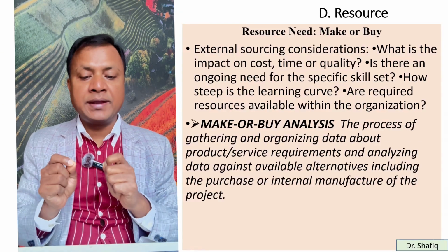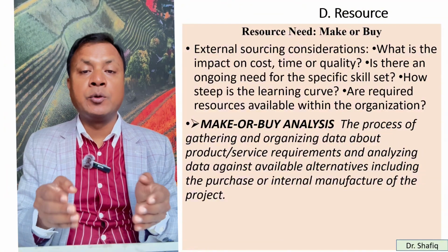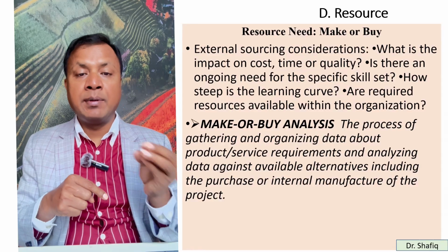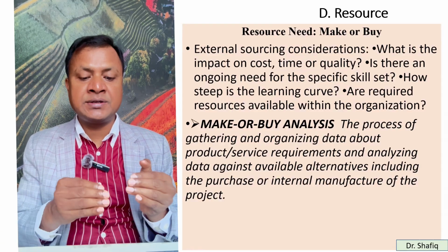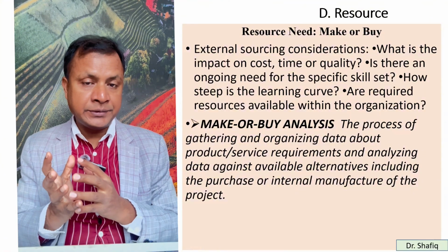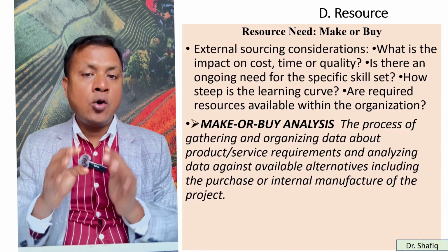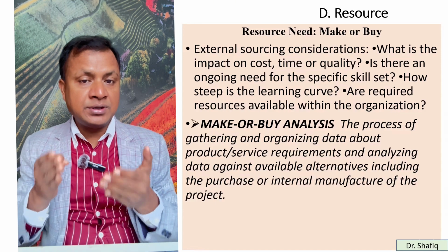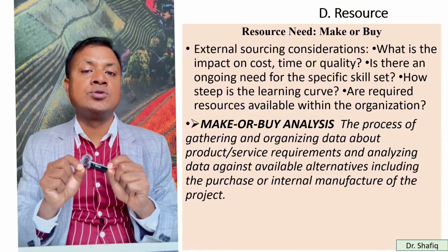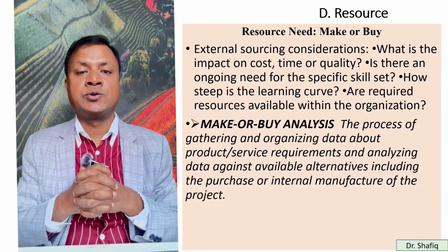So make or buy analysis is the process of gathering and organizing data about product and services requirements and analyzing the data against available alternatives, including the purchase or internal manufacture of the project. So whatever resources you have in the organization, either team members or the equipment or the materials, or if you don't have them, based on this and the scope of work, you have to decide whether you will use your existing resources or you will buy from external sources.